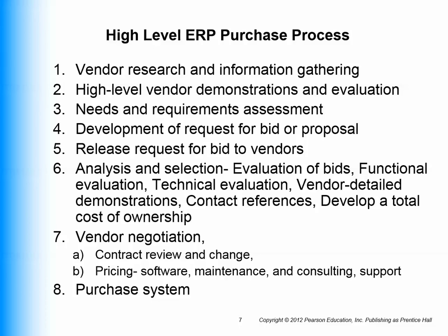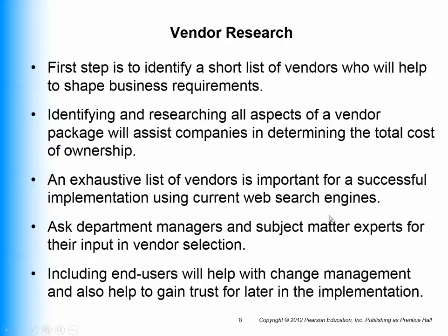You evaluate it both from the technical side, functional, reviewing demonstrations. Very important to contact who these vendors have been working with, see if they're satisfied customers. Try to understand what the total cost of ownership is, because it's going to be a lot more than just the price. There's going to be negotiation, and typically, in addition to the vendor itself, you're going to be working with consultants who help you implement this. The consultants may come from the vendor itself, or you may have a third-party consultant to help you do it.